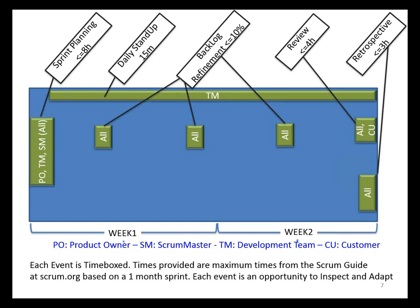And again, the lesson learned there is to ensure that there's appropriate test representation in those estimates. And I think one of the best ways I've seen that done is using story point estimation with planning poker. So planning poker is the wideband Delphi technique effectively, and it's to try to get a true team-based estimate with the various perspectives represented, and in this case including and integrating the test perspective. And through an iterative process you come up with a true team-based estimate that reflects the various work that has to be done, and therefore the estimates associated with the pieces of requirements that you've got.